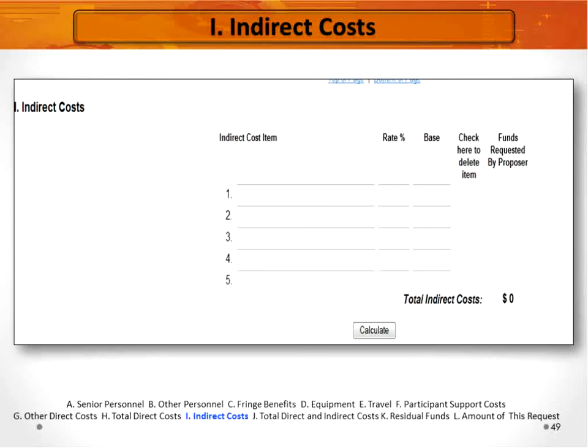For determining the indirect cost amount for your project, you will need to determine something called a base amount for the indirect cost calculation. Indirect costs are typically either based on an institution's personnel cost or on the cost of all institutional operations. If based on personnel, which is the most common, then the base will be the total for personnel salaries or perhaps salaries and fringe benefits that you're requesting in your budget. If the indirect cost is based on institutional operational costs, then the calculation is a little more complicated.